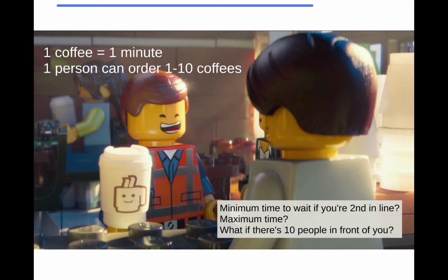100. So there is inherent variability as queues get longer, and one of the things that teams often fail to recognise is that when you promise something by a certain date but there's a really long queue, the inherent variability in delivery will mean that the further out it is, the less likely you're able to predict when you can actually deliver it.